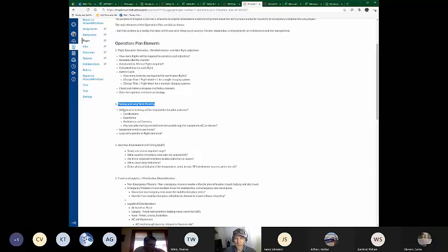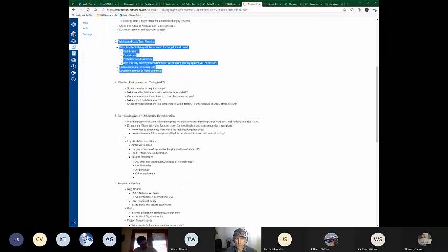If I need to acquire a specialty payload, or if I need my operators to acquire a particular skill, we need that rolled into that long-term operations plan, right? So that when the day comes to fly, that training is already part of the operator's psyche and can roll right into those effective flights.